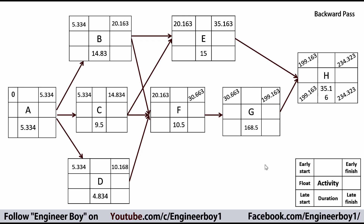Activity H is a critical activity because subtracting the late start from the early start gives zero float. We forward the late start of H to G and E, then subtract the duration of G and E to get the late start of each. Then we pass the late start of G backward to F and subtract the duration of F, giving a late start of F equal to 20.163.